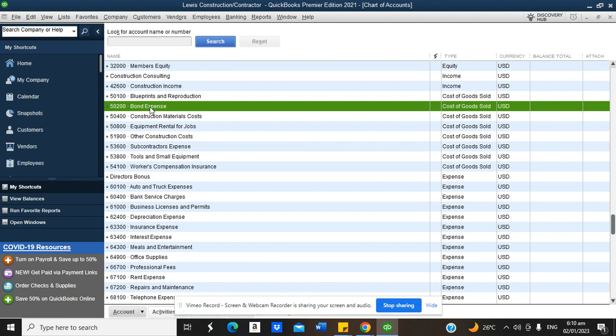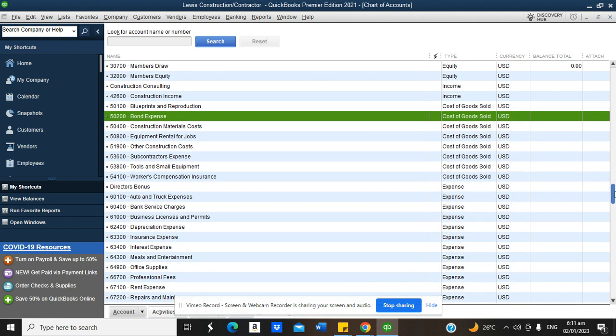So now when the bank gives you that loan, you're going to be paying expenses. You're going to be paying interest on that loan. It might be very small. So the interest you pay on that loan is what we call your bond expenses. That's like your interest expenses for collecting a loan from a bank to help finance that construction project.